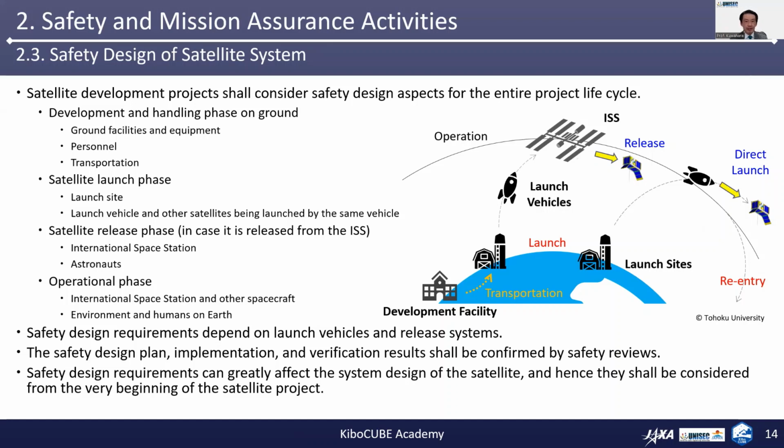So in this way, the safety design requirements for satellites depend heavily on launch vehicles and release systems. And the safety design plan, implementation, and the verification results shall be confirmed by safety reviews by the related organizations. You also need to be aware that the safety design requirements can greatly affect the system design of your satellite, and hence they shall be considered from the very beginning of the satellite project.